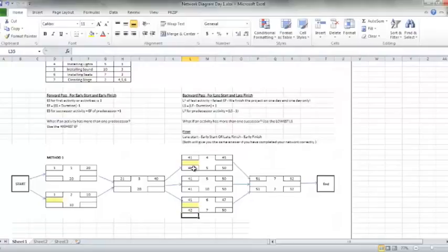So let's step back and make sure that's correct. Okay, so we have late finishes all came from the predecessor, the late start of this one. That makes sense. Now, our late start, again, is equal to late finish minus duration plus 1. So that's how we got our 50 minus 5 plus 1 is 46. My 50 minus 10 plus 1 is 41. And my 50 minus 7 plus 1.